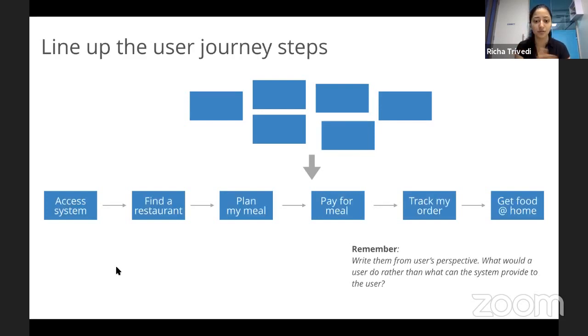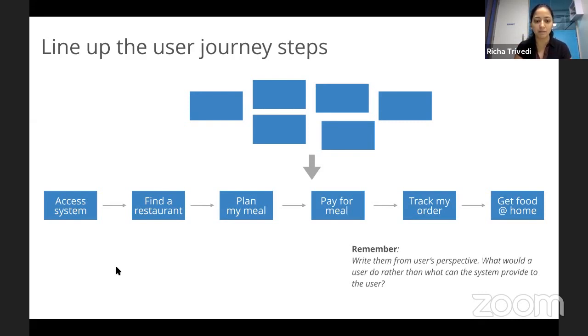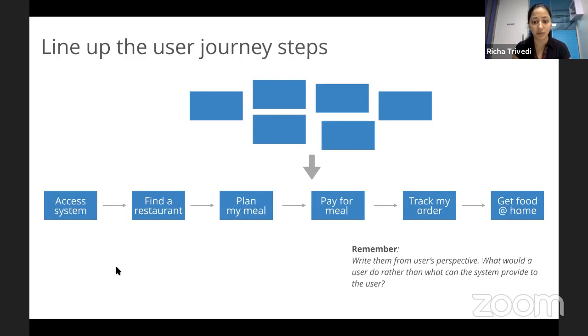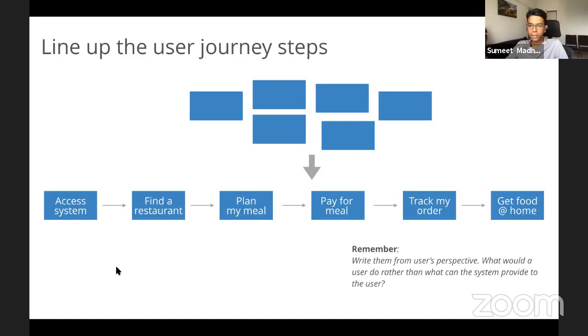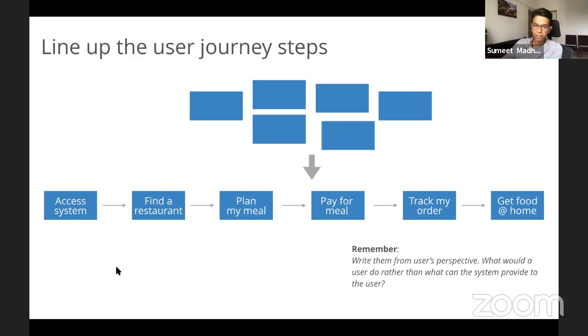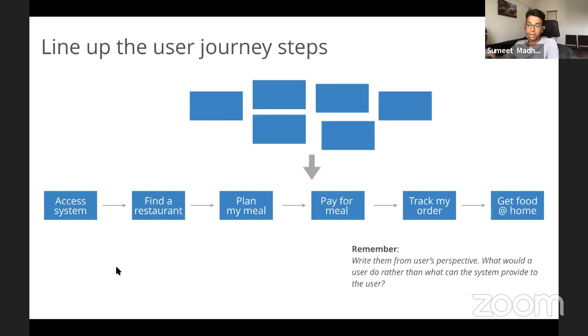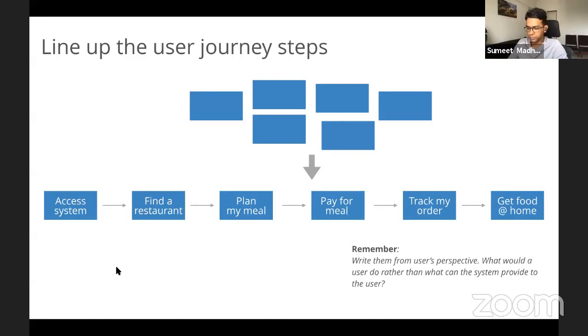So if we again refer back to our Swiggy example, these are the steps, how the major steps from Swiggy would look like. And just to add a little bit of a nuance, the major steps are in the articulation from a user goal perspective. So the user wants to access the system, the user wants to find a restaurant, the user wants to plan a meal, pay for the meal, track their order and then get food at home. And so what that does is helps tell a cohesive story.